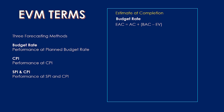The Estimate at Completion (EAC) is the projected total cost of the project at completion. Under the budget rate method, EAC = AC + (BAC − EV): you take the actual cost already incurred, then add the remaining work — which is total budget (BAC) minus earned value (EV), representing work already completed. That sum gives you the EAC, the estimated cost at project completion.